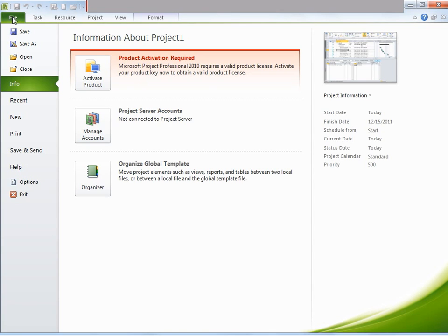Complex projects require a combination of top-down and bottom-up approach so that accurate tasks and phases can be created. It is not uncommon for the management to design major phases of the project, which is top-down approach, and then let relevant department resources fill in detailed tasks for each of those phases, which is bottom-up. In top-down planning, an overview of the project is formulated, specifying but not detailing any summary tasks, which means an approach from general to specific. A bottom-up approach is piecing together of tasks or subtasks to give rise to the grander tasks or the phases, which is an approach from specific to general.